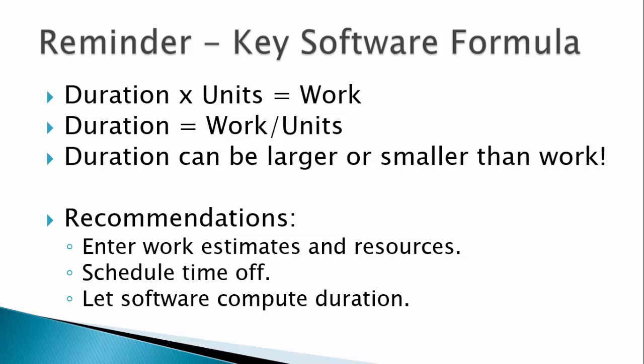As we go through this and other lessons, I'm also going to show you how to enter the work estimates, enter the resources, schedule the time off for resources, and possibly indicate they have less than 100% capacity for the project, and we'll let the software compute the durations. There are other ways of doing this that are possible, but I've found from many years of experience that this gives you the best model of time for your project.